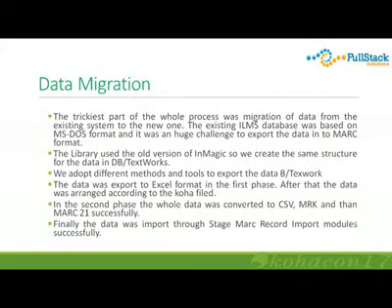A testing service was made in order to test the data migration. This was the trickiest job for me. We converted the data into MARC 21 format more than 10 times. But usually when we uploaded to the testing server, we faced some problems. Sometimes the author was missing, sometimes the ISBN number, and sometimes other library codes. So this was the trickiest part for me, and after 10 to 15 attempts, we converted the data and successfully migrated it in the final stage.